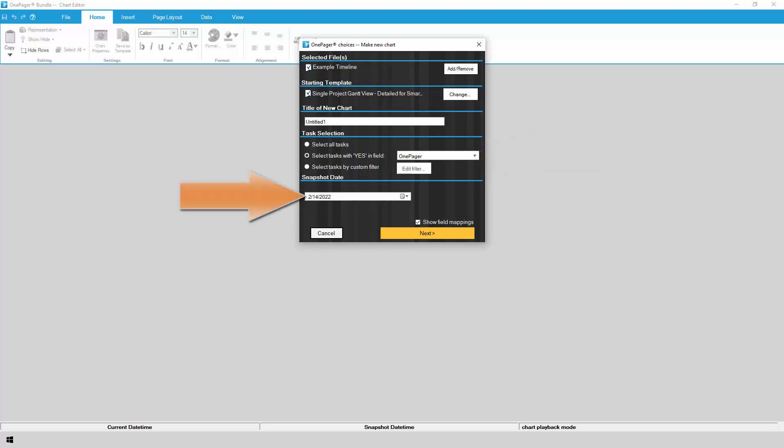Choose the date for your snapshot, which serves as the status date of your chart. Over time, you can add multiple snapshots to your chart at different dates and track changes as the data is updated back in Smartsheet.